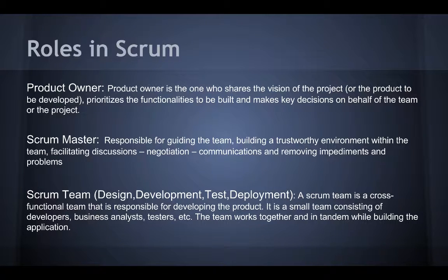The reason why certain people can't hold Scrum positions in an organization is due to the fact that it causes a conflict of interest and weakens the process as a whole. In my experience, QA leads should be the scrum master. Product owner should be someone in the product team. Engineering management should never be a scrum master or product owner because of the conflict of interest it causes. The team should be cross-functional and focus on the feature or feature set — members should include UI, user experience, back-end, front-end, and operations people. You need a team to rally around the product feature or objective. The need to see it from conception to completion brings out the intrinsic motivation to make it work and be a success.